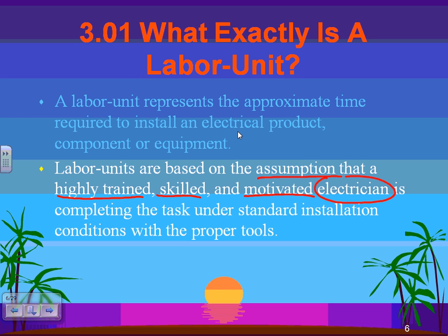And so that's just about the person. And the task is under standard installation. The task that we're doing is under standard condition. No hazardous location. We're not working 20 below in Minnesota outdoors. That's not standard condition. Standard condition, heated and cooled places, right? Not too hot, not too cold, not too high, not too low. No confined spaces. Standard conditions.